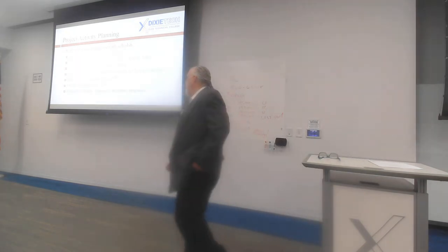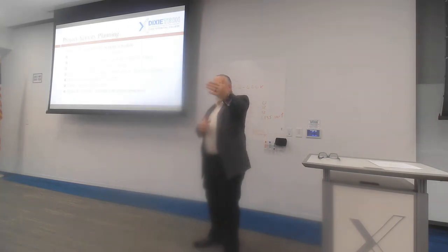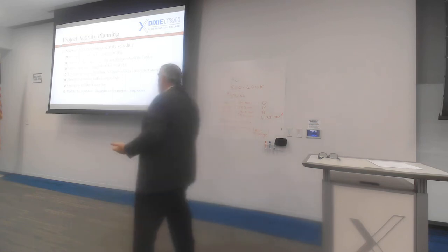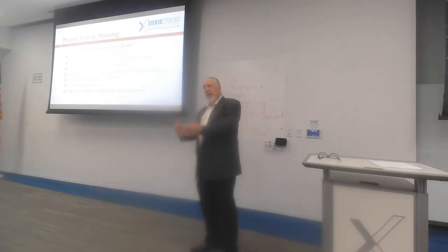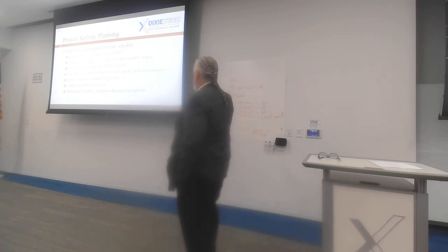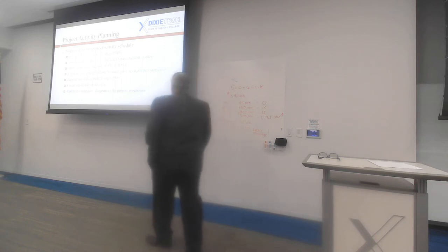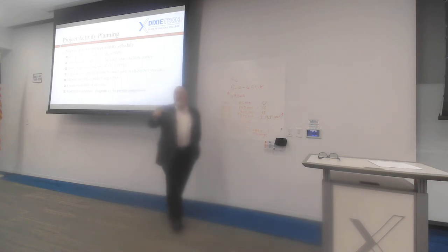The steps we're going to take, and this takes us to kind of where we are. I'm going to the beginning just to show this is the sequence. This isn't the finish. That gets us to where we are right now, almost halfway through this class. We're about halfway through the process that we need to do. So we've got the work breakdown structure. We are going to take from the work breakdown structure and develop an activity table. That's what we started with.